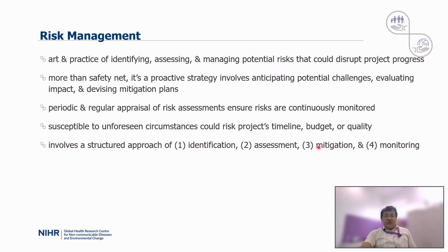Two, assessment. Risks are assessed based on their probability or likelihood and potential impact. Moreover, high likelihood risks with severe consequences require immediate attention, while lower level risks may be monitored.